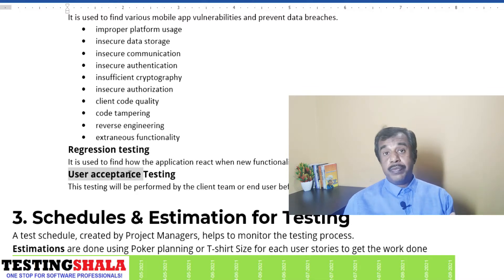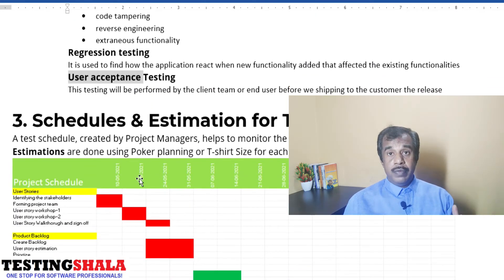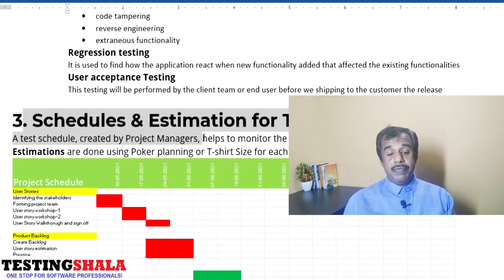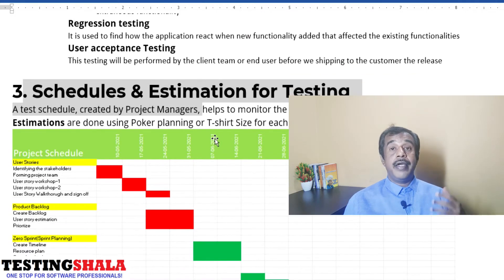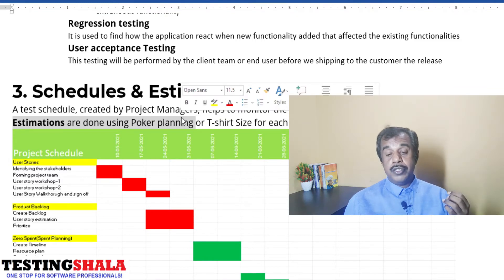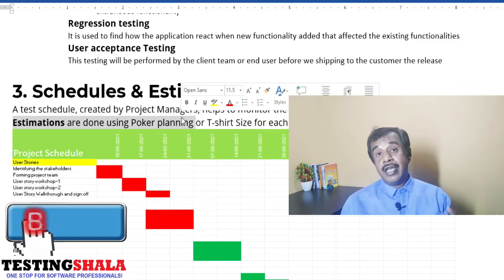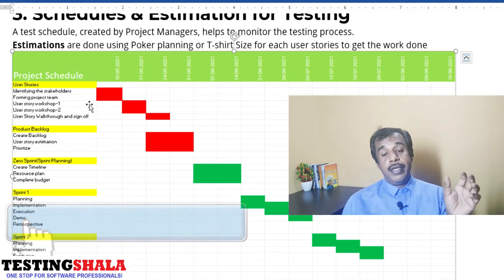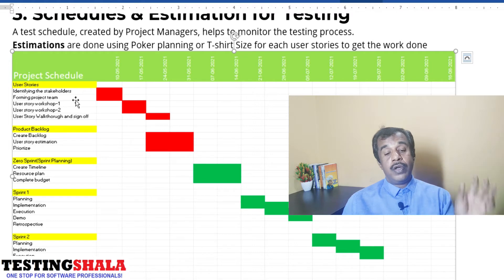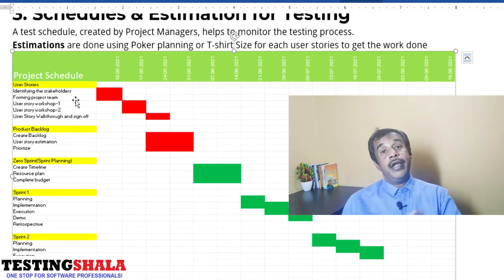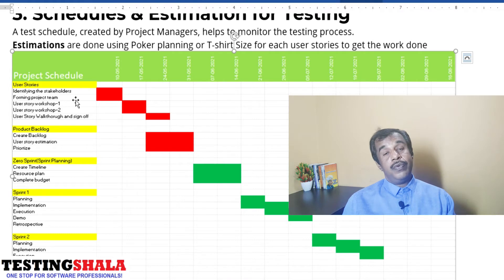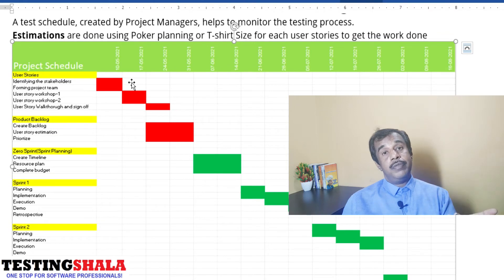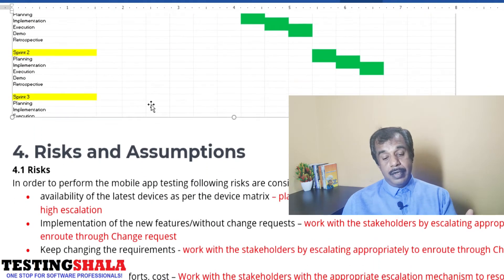We also accommodate regression testing and user acceptance testing for mobile app testing. The third section of the test plan covers schedule and estimation. We perform estimation using poker planning and shirt sizing in agile methodology, arriving at estimates for every user story — development effort and testing effort — then derive the overall schedule, number of sprints, resources required, and overall cost.